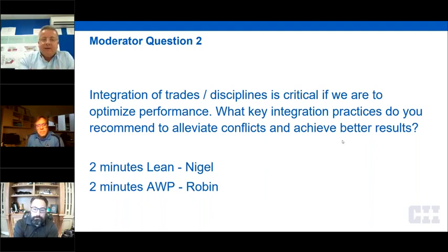And then at physical trade level with the guys themselves, with the superintendents, as you guys call them, and the foremen, and the black hats, as we call them over here, it's about getting them involved in the planning. They are the last planners. They are the last people to do any planning before you put people to work. So they need to be really understanding what they're doing and be as constraint-free as possible. And it's about supporting them and giving them tools to help make that planning easier and making them 70, 80% reliable, not 50% reliable. It really brings home the bacon, as we say over here.